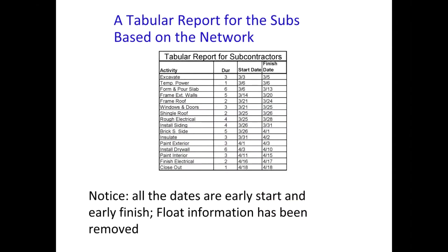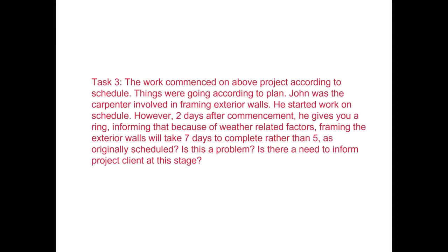Right. So when we communicate information with the subcontractors, we don't want to give them the late timings, because then they could use the float. So we will be sharing the early start timings, but we would exclude the information on the float. We do not want the subcontractors to have the liberty to use the float on their own. This is something which the management team will be keeping. So all the dates are early start and early finish, and float information has been removed when we are communicating information with our subbies. So we will talk about a few problems in this scenario.